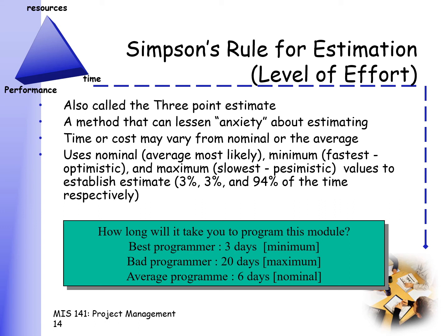And you're not going to just be dependent on one person's estimate. So let's give an example. Supposing you have, as part of your work breakdown structure, a module that needs to be programmed. So instead of just relying on one programmer who might be the best programmer and asking, how long will it take you to program this one? He says, oh, that will take me 5 days. And eventually later on, you're not going to get him. You're going to get a slow person. Your duration will already be off. Actually, your whole schedule will be off because your 5 day estimate is based on a person who is good, but right now is not participating as part of your project.